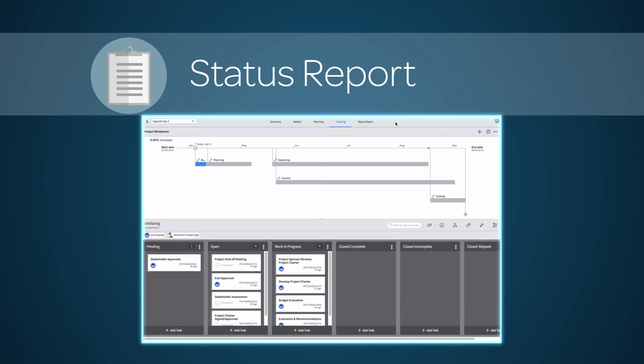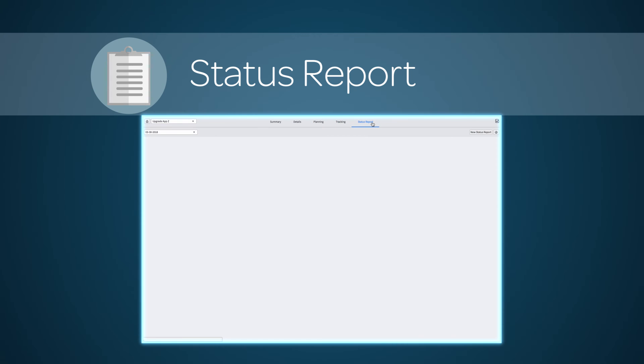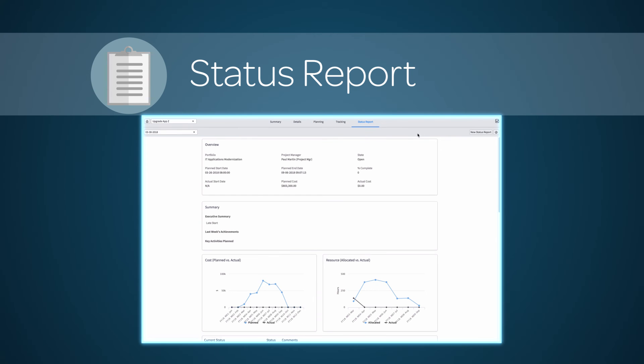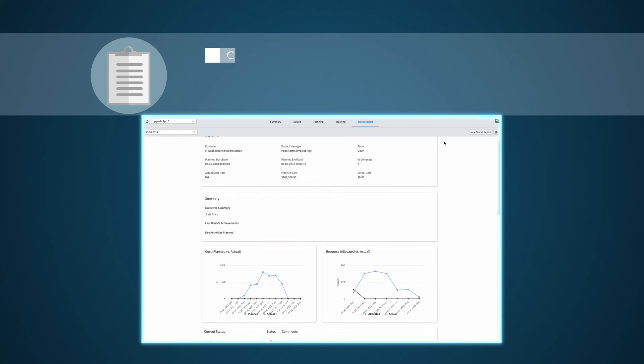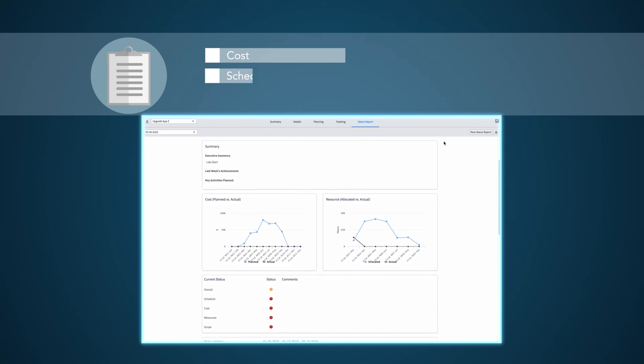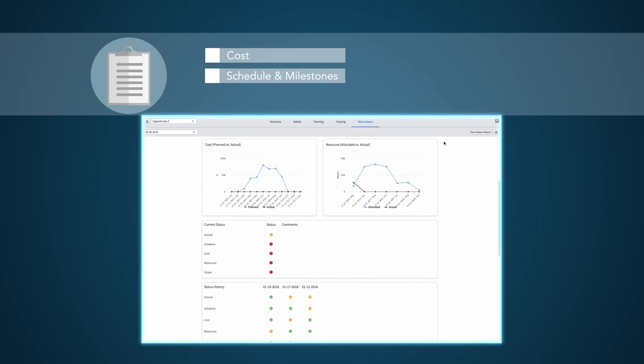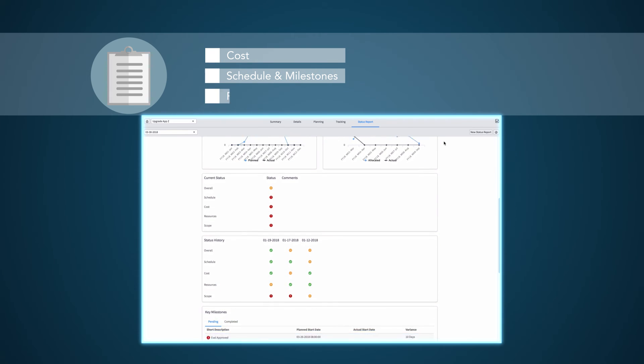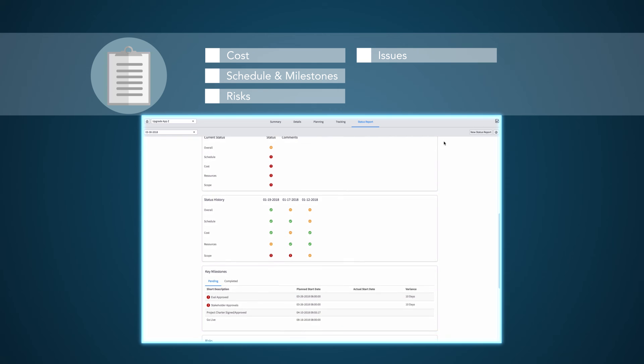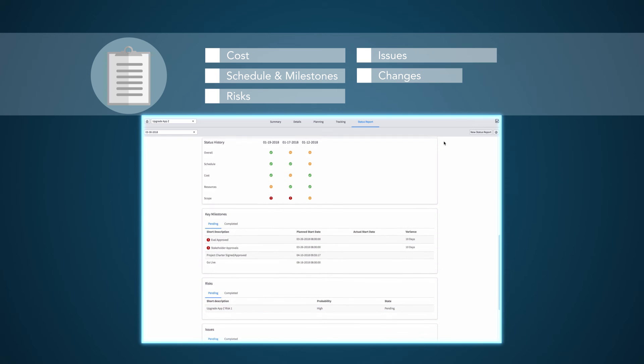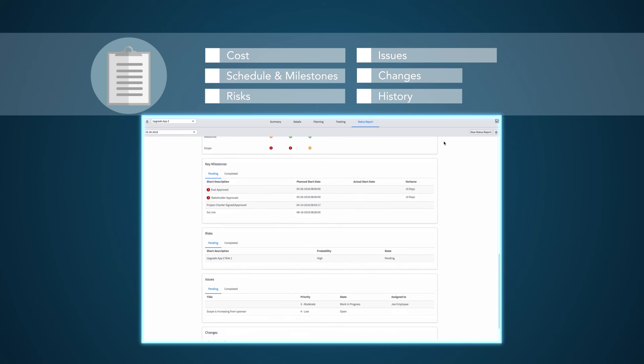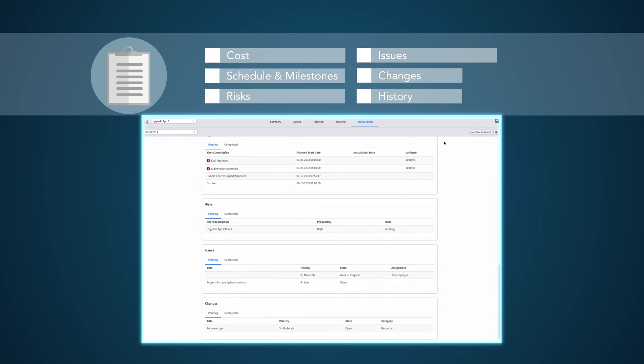The Status Report console shows recent progress of a project from several categories, such as Costs, Schedule and Milestones, Risks, Issues, Changes, and History from Previous Status Reports.